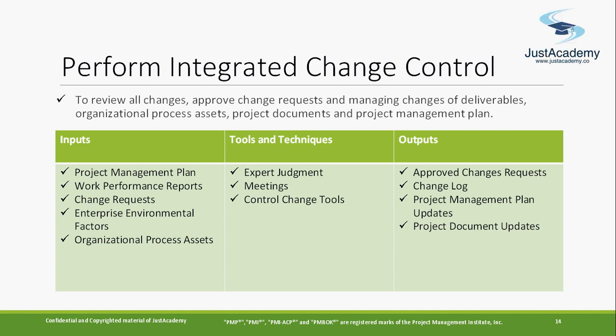Okay, so now this perform integrated change control is basically done by the change control board. The change control board is nothing but people from the business sponsor who is requesting a change, and project team members, maybe the team lead, or project manager, or functional lead.